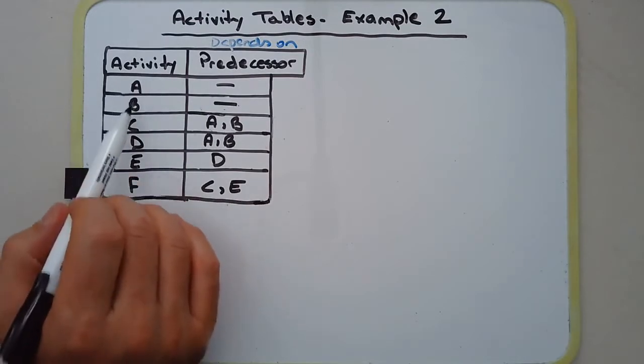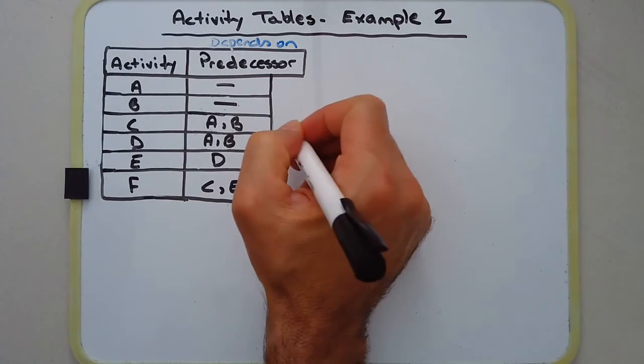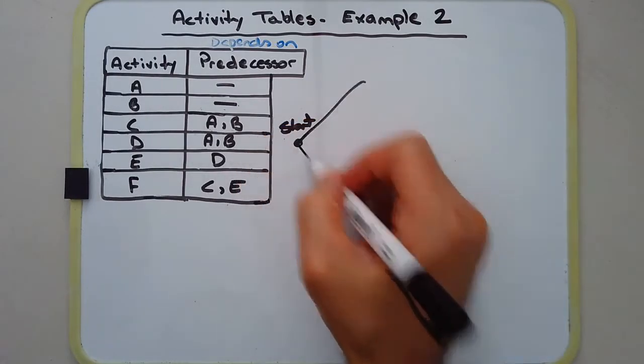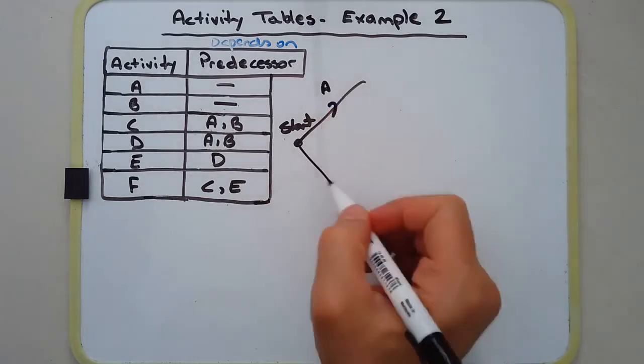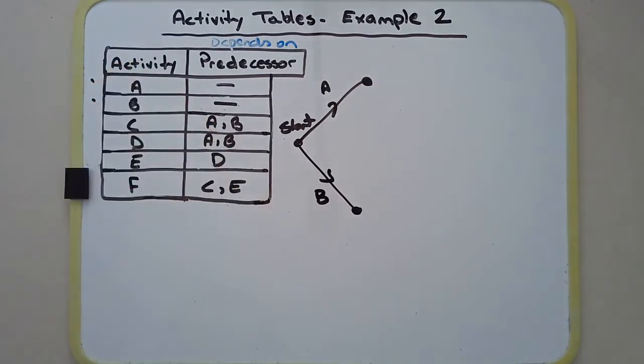So let's start. Activities A and B do not have any predecessors, so why don't we start off with our starting vertex and draw in our two activities A and B. Okay, so they're done.